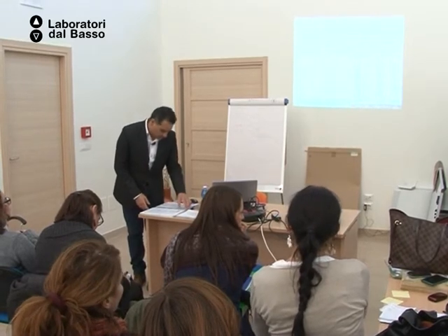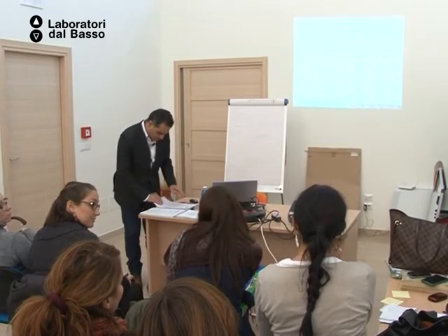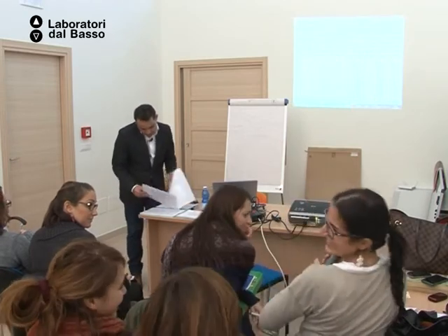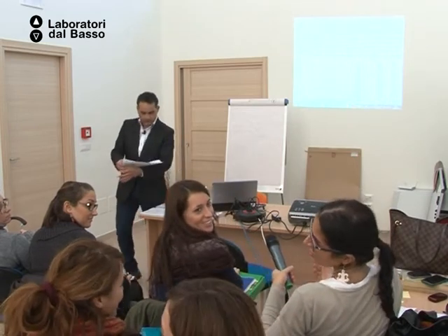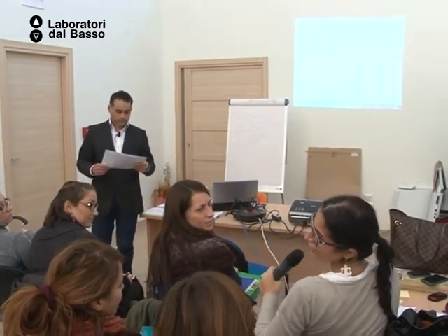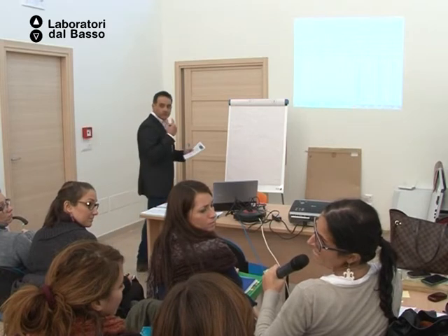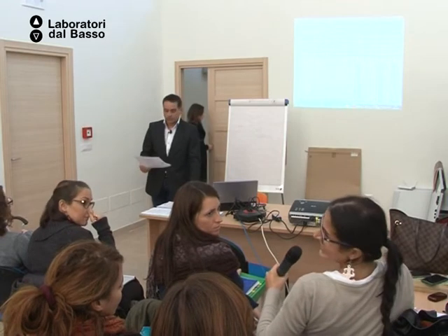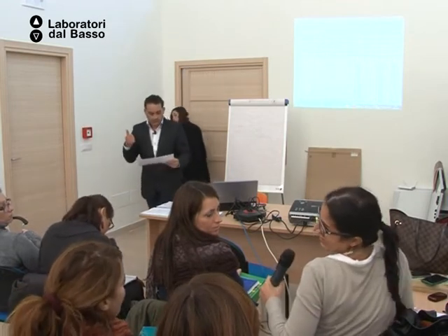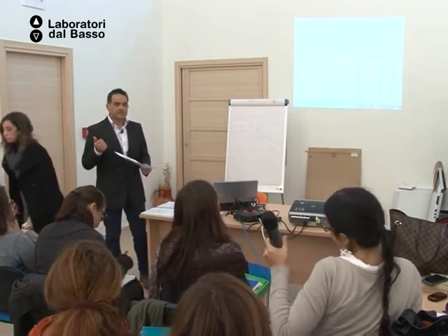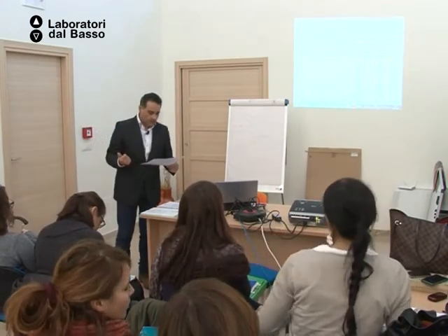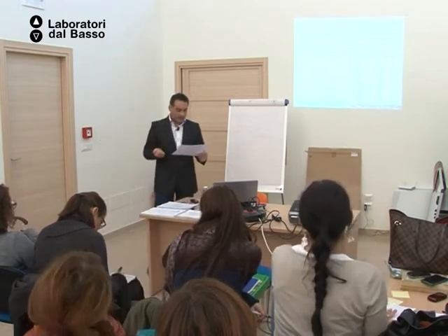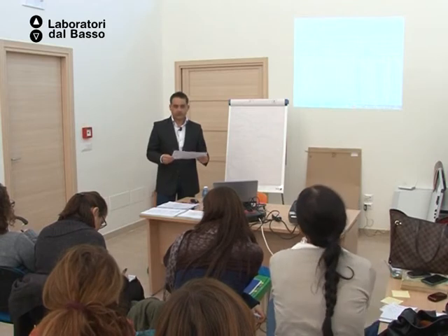I think, I'm not sure, but I think not. You don't. It's a item that in general they use at the maximum because this is the 7% of trust they have with you. They must not be justified by supporting documents, and they do not have to be detailed in the final report.